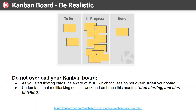Here's the problem. My daughter was uber smart at six. When she started using her board, she came back and said, 'I love Kanban — this stuff is magical. On Friday I write a few things on cards, and two days later it magically happens.' So she went berserk and started wanting to go to Disneyland every weekend and do 20 things. We can't do 20 things, especially when we've proven through metrics that two to three things were realistic. Every time we tried to do more than three things, we tended to miss or fail one of the cards. We found our sweet spot as a team of two over a weekend was three cards.